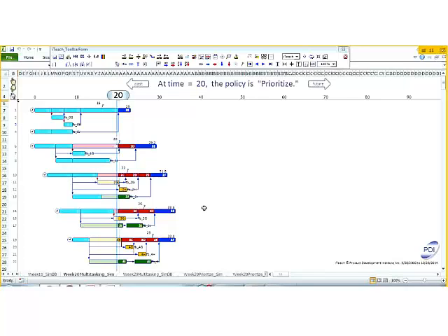You have to make it very, very difficult for the resources to multitask. Best way is to take that work off of their plate if you can. So when we freeze the projects, we're taking the work off their plate. We need to make it very dangerous for people to continue to work on projects that are frozen.